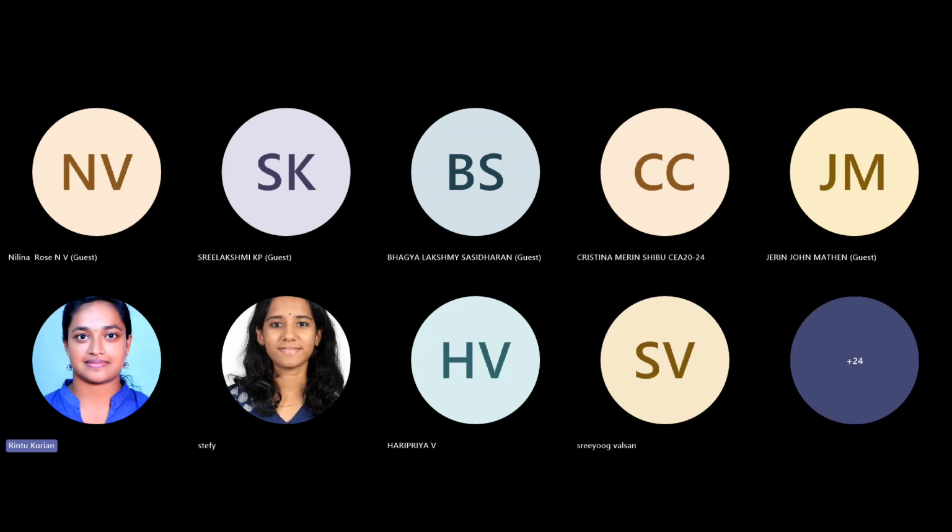It will become an additional expense in your budget which has no utilization rather than generating waste. And recycling cost, like if you plan on selling the waste material, you won't be getting back what you paid. When you purchase 1 kg of steel, it will be 90 rupees. When you try to sell as scrap, you won't get 90 rupees, you might get 50 or less than 70,